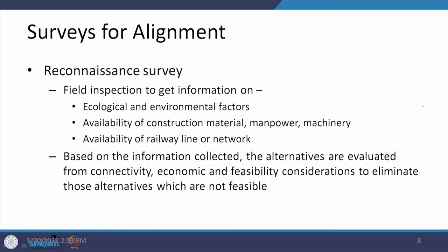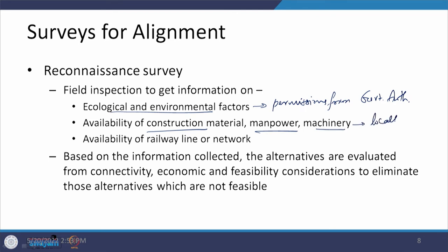Apart from what we have discussed, there is another important aspect to take care of — ecological and environmental factors — because this may result in different permissions which need to be acquired before construction starts. So permissions from government authorities will be required. Availability of construction material, manpower, and machinery also matters — if locally available, that is the best outcome, but if transported from another location, it adds to the cost.